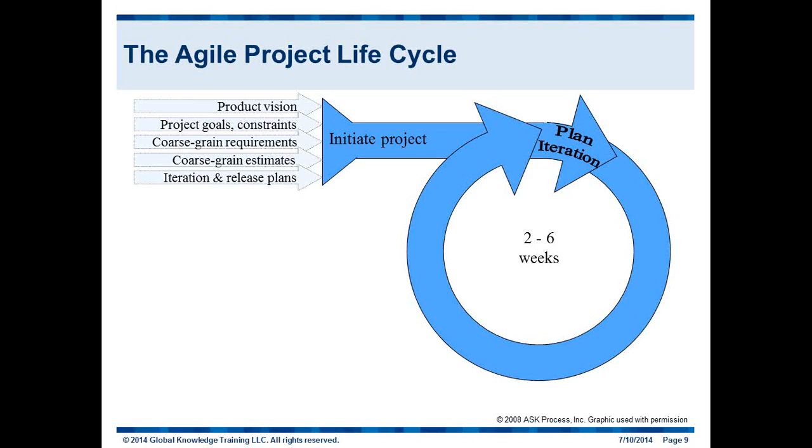And from there, we start to identify the different tasks, so the team works collaboratively to identify all of the tasks and activities that need to happen to take that feature from a conversation we've just had with our customer and transform it into shippable code. So code that by the end of the cycle, we could actually put into production if we wanted to. So thinking about going through all of the steps of the software development life cycle, designing it, coding it, testing it, documenting it maybe, creating training materials maybe, everything that has to happen before we consider that feature ready to go to production.